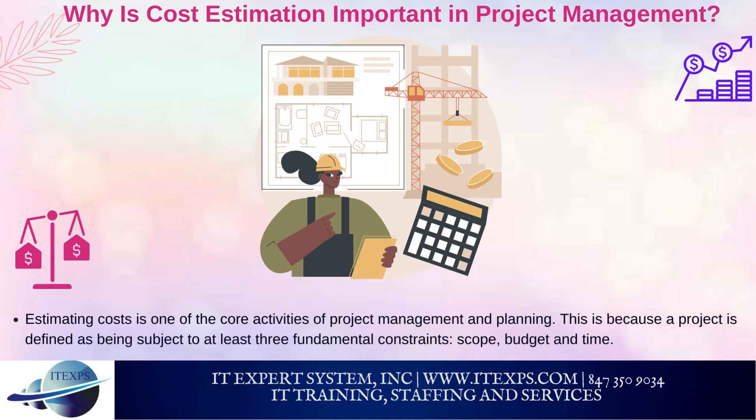The initial rough cost estimate is usually included in the project charter as well as in the business case of a project. The estimation of costs is also necessary to compute the project budget, which is subject to the approval of the project sponsor. In fact, the process 'determine budget' uses a technique called cost aggregation, which directly refers to the outputs of the estimate cost process. Cost estimates are the basis for allocating budget to work packages and deliverables, which can be politically sensitive within a project as well as among its stakeholders.